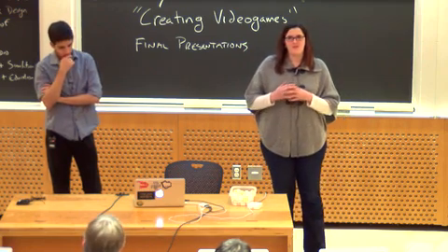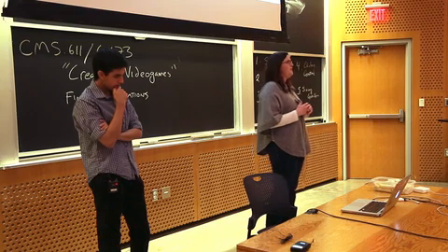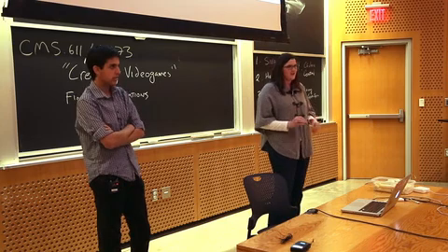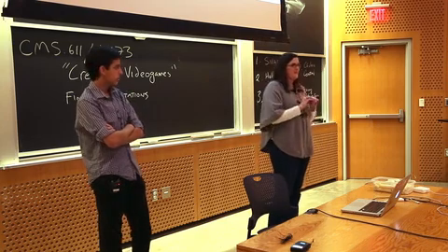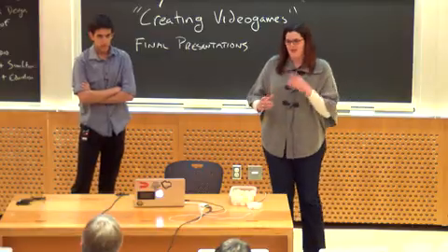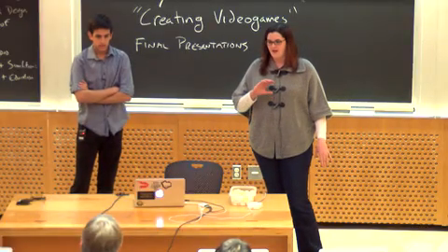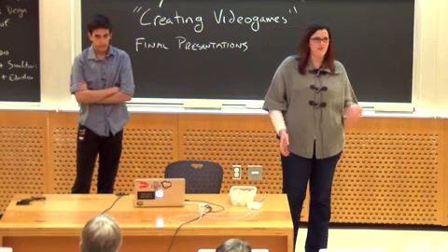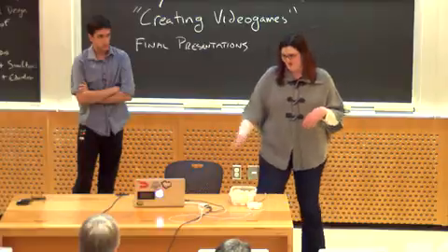I found, towards the end of the semester, it took me a while to figure this one out, but if you give people vague instructions, they will wait until the very last second. But if you make it crystal clear exactly what you want them to do and give them as detailed instructions as you can, it's much more likely that it'll get done in a timely manner. And also, we felt really restricted by the topic and their requirements, which was another problem in motivation.